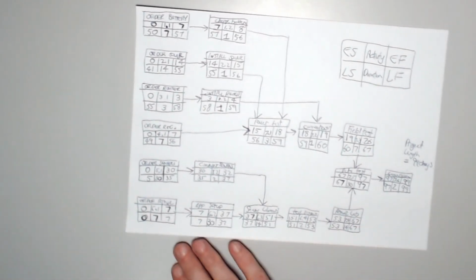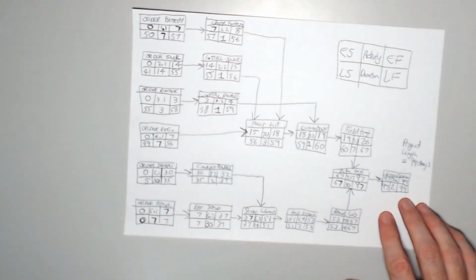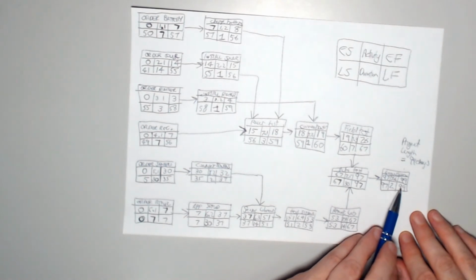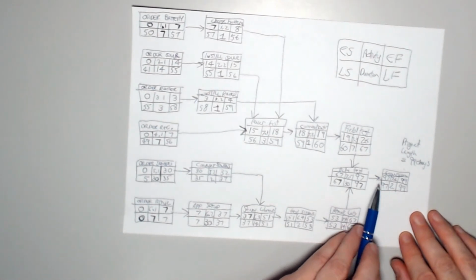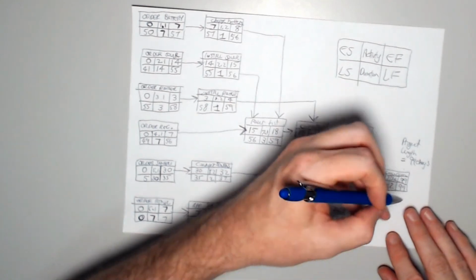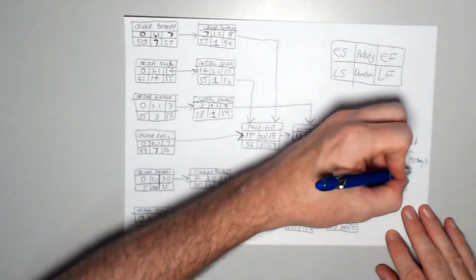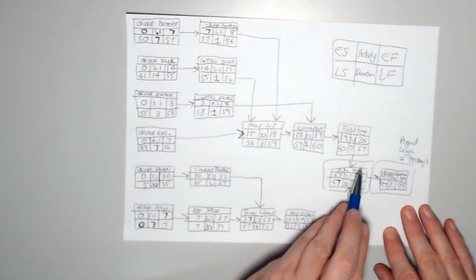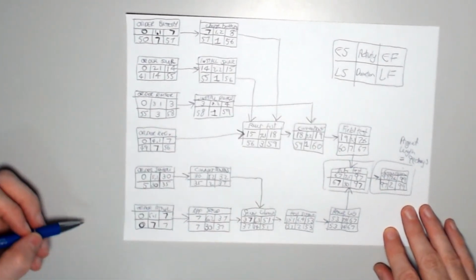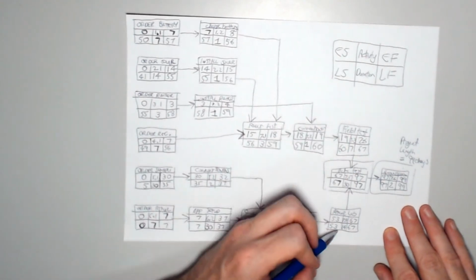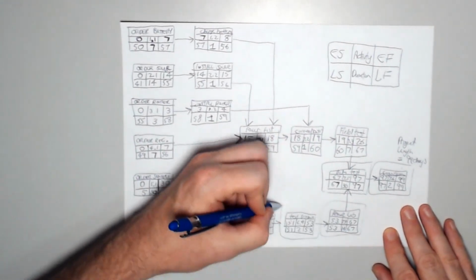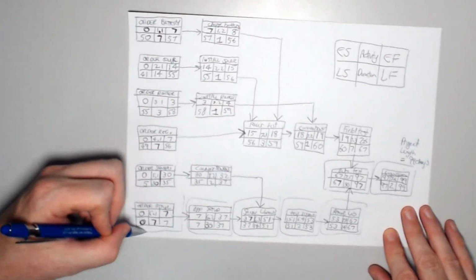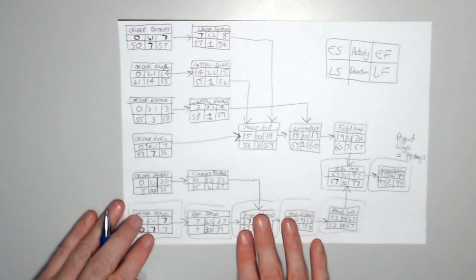Okay, so you know it's your critical path because these numbers, top and bottom, so the early finish and the late finish are the same, and the early start and the late start are the same on the critical path. So it's going to be this guy here. These are different, right? So actually the critical path is down the Atmel route. So if it's going to be here, it's going to be here, here. What about up here? No, it's going to be this one here. Okay, so we found our critical path.